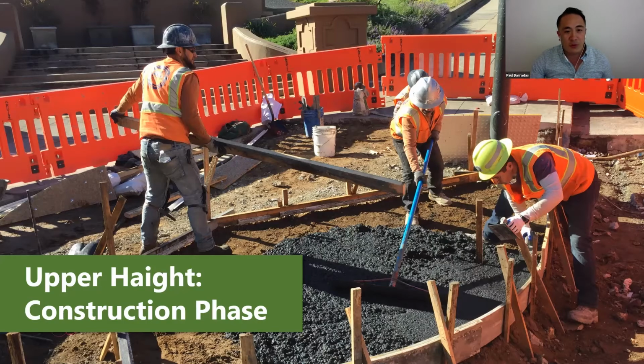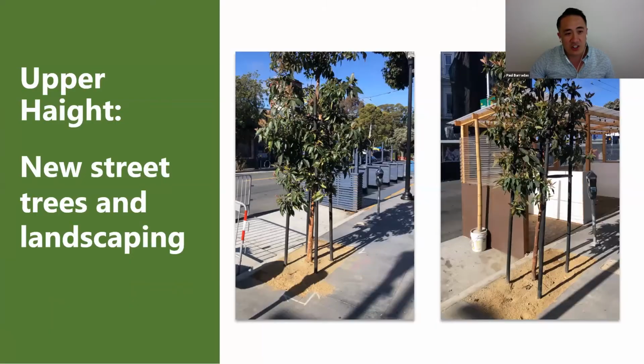The plan to improve the corridor was a community-driven process, which included neighborhood meetings where the neighbors and merchants mentioned their concerns for a safer Haight Street. Construction on projects nearby this area left this community wary of construction, so we had to coordinate very closely with the 100+ businesses on the corridor that opened their front doors to the construction of this project every day. And we had to create very careful work zones to make sure we heard the concerns of the community.